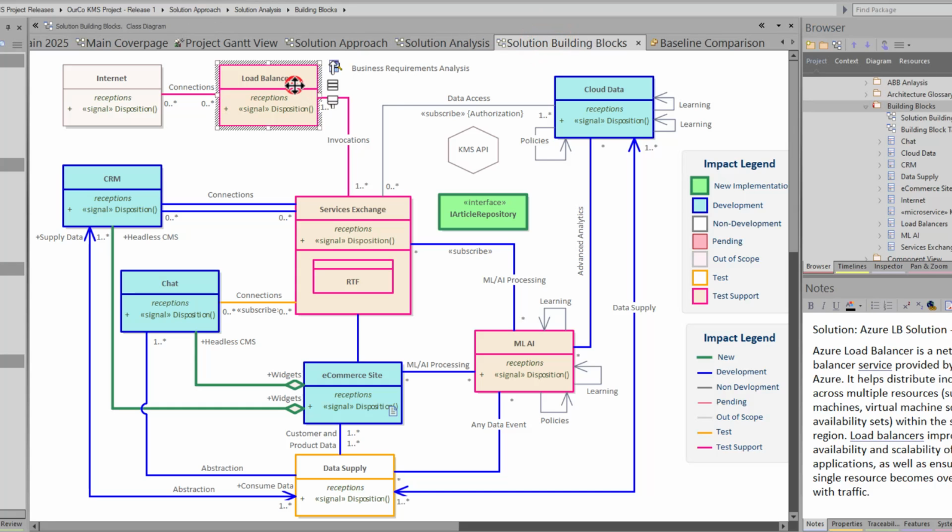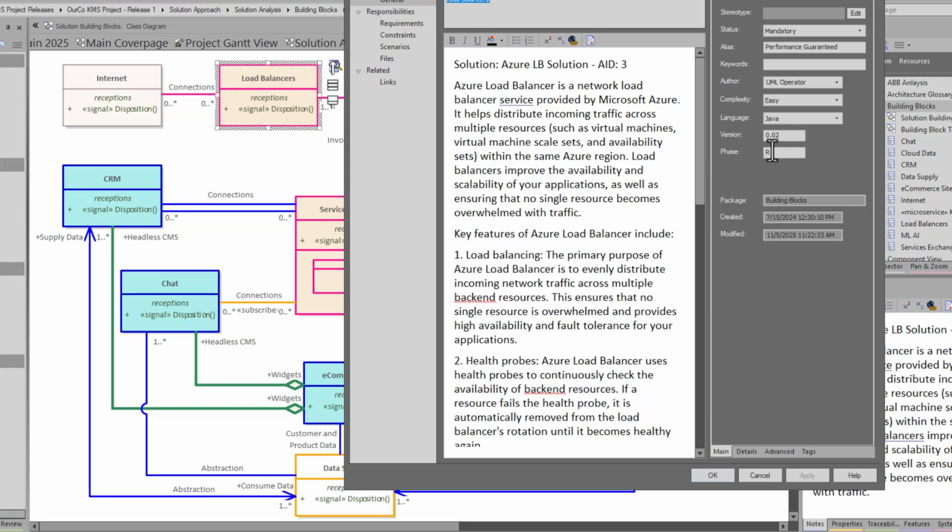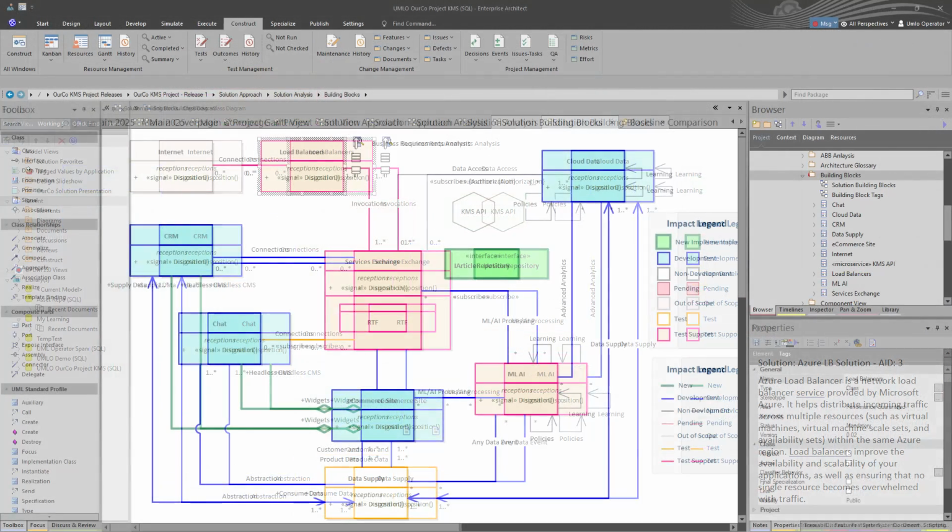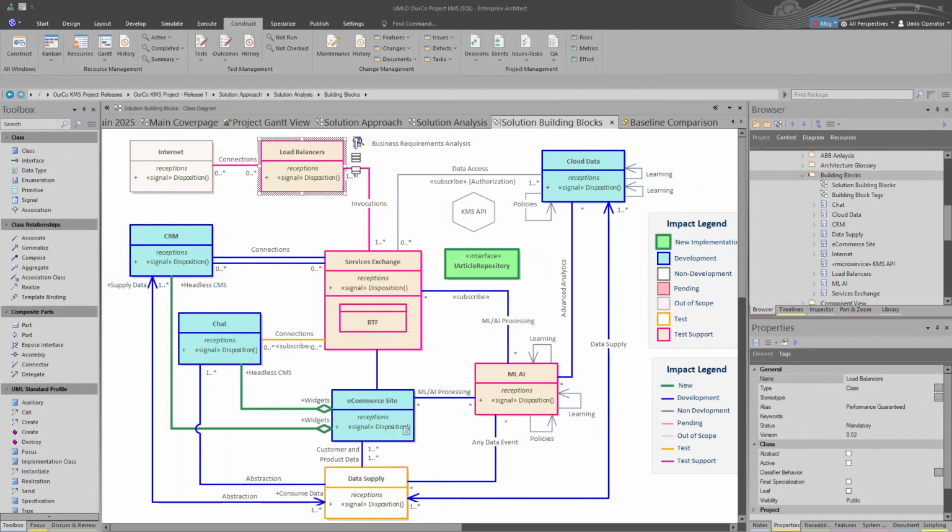This is called baseline. To understand what this snapshot is, we set a version number. Get in the habit of versioning each time you make a change, but be clear on what make a change means. Fixing spelling errors is not versioning or need to version, in my opinion.